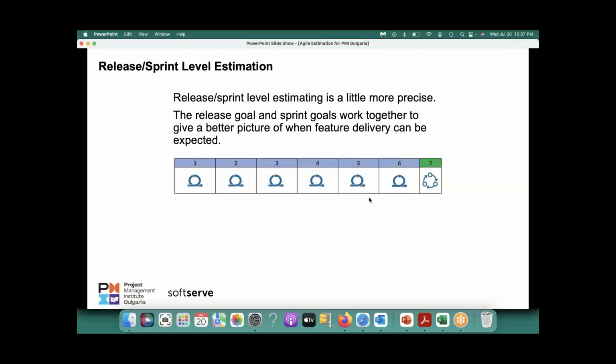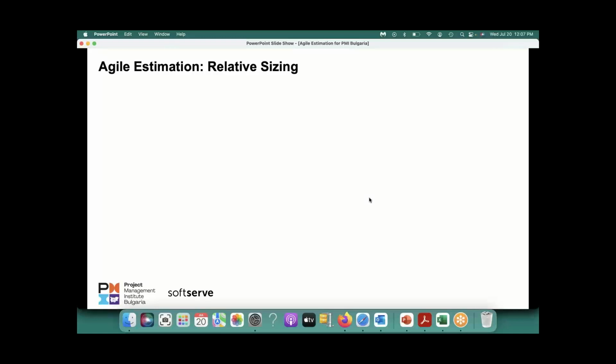When you finish towards the end of the first release, you will go and plan the second release, okay? But initial release planning will be how many releases, and in the first release, how many sprints are going to be there. So that's the release level planning, and this is what you want to achieve from release level estimation. Okay, so release level estimation is called relative size, and it is a consensus based technique applied at the release level. Consensus based means everybody agrees, right?